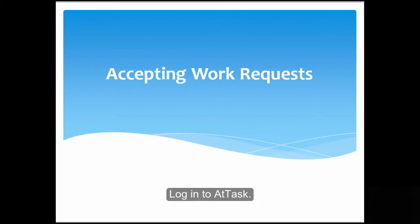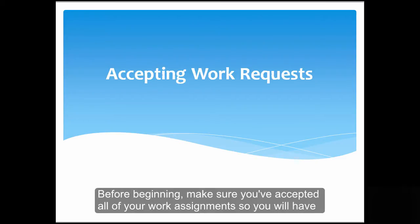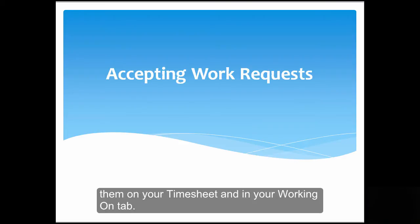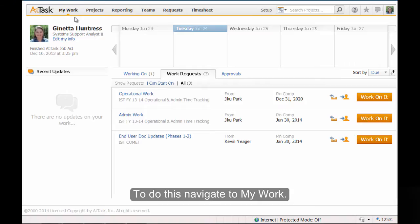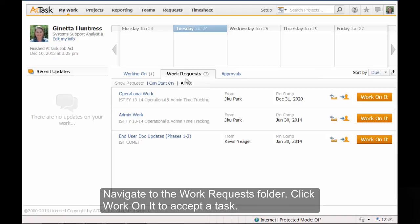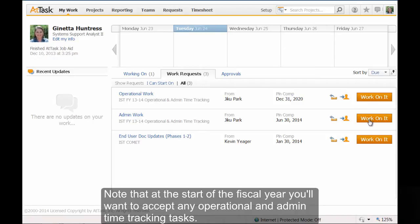Log in to ATTASC. Before beginning, make sure you've accepted all of your work assignments so you will have them on your timesheet and in your Working On tab. To do this, navigate to My Work and then to the Work Requests folder. Click Work on it to accept a task. Note that at the start of the fiscal year, you'll want to accept any operational and admin time tracking tasks.